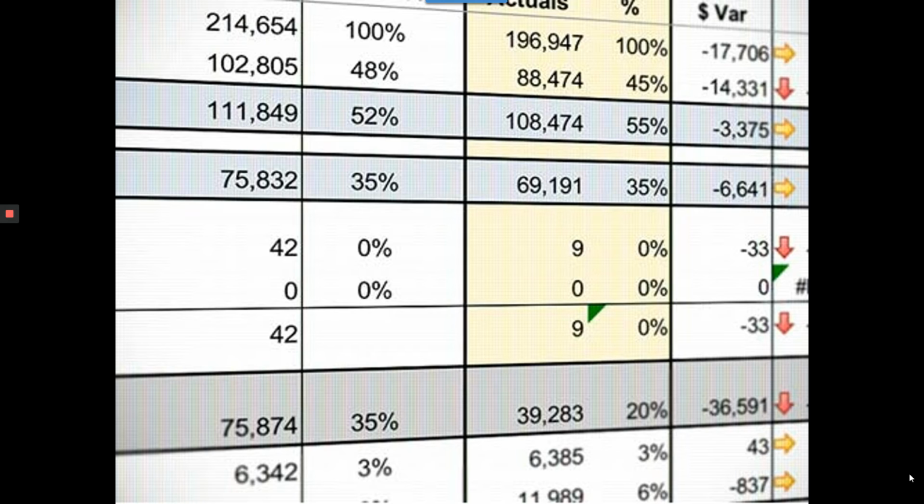We will look at the details. We'll look at the unit cost that has come up, or we will even drive deeper into the estimate and talk about the crews that we're using, the productivity that we're using, and that kind of detail. So CTN can provide that next tier of construction estimating insurance that the owner needs to see as you guys develop the construction phases for the project.